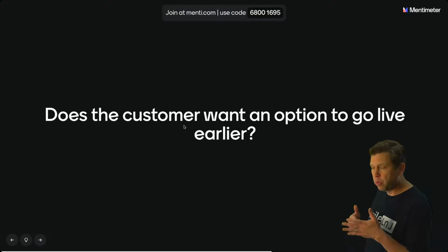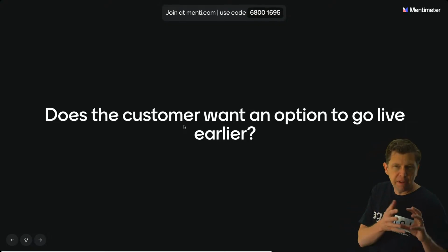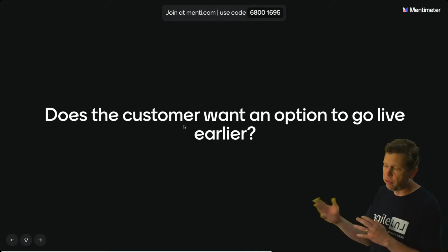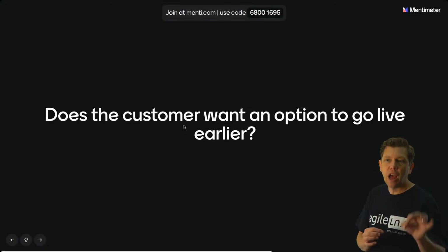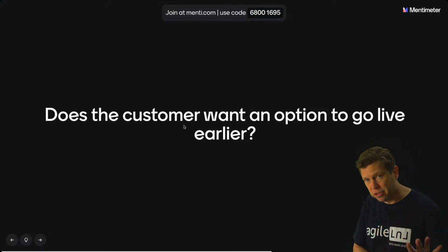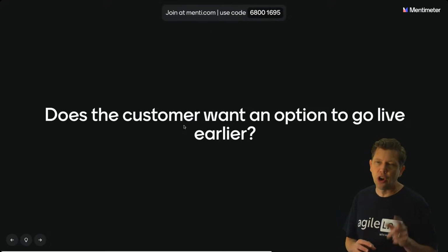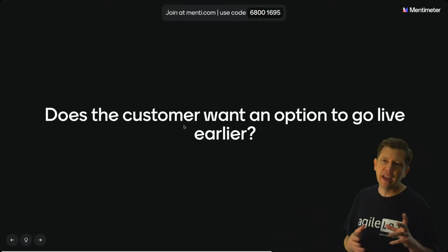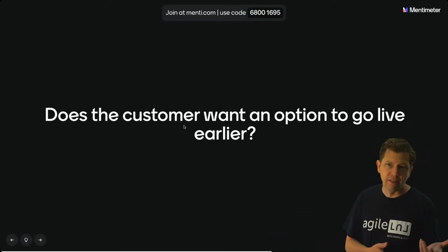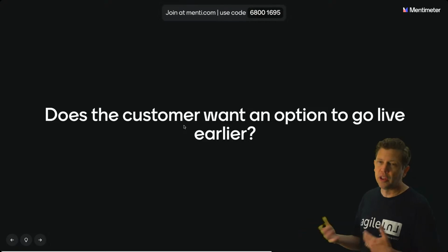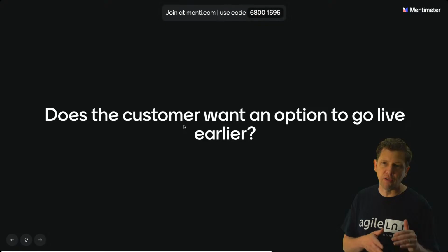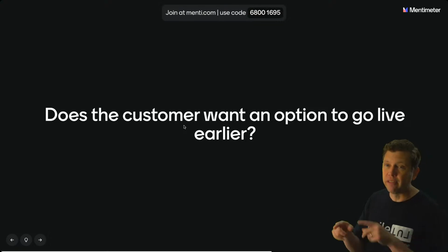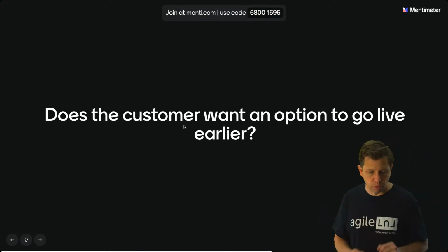And then it comes down to saying, okay, let's make sure that we're building just the minimally viable part of what you need, which often means splitting stories into different parts and doing part of them and deferring other parts till later, because that gives you the option. It also puts you in the driver's seat, because if you get to a point and you're like, no, we really want these other things, that's fine. We can always delay the date that we go live, but we can't take work that we did that we now are willing to not have and trade it for something else in the future. The closest thing we can do is being really careful how we prioritize and how we approach this MVP concept today in order to give us options in the future that we wouldn't have if we did it a different way.